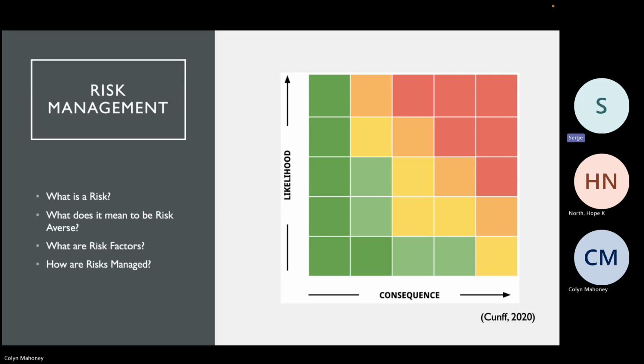Can you give some examples of positive risk? Yeah, most people, when they hear the word risk, they think negative. But some examples of positive risks in an IT project are things like getting a grant you applied for and getting additional funding that you weren't planning on, or some kind of change in policy that would result in the relaxing of requirements. These would both cause changes in the project for sure, but if handled correctly, would be a positive result for the product being produced by the project.